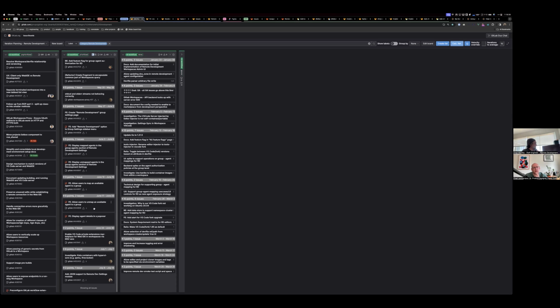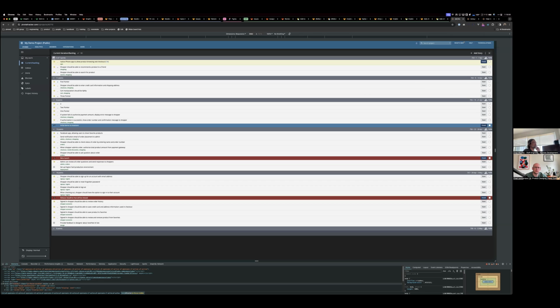You're not trying to predict the future. It's yesterday's weather: whatever you did in the past, including lower capacity, is what's influencing the future. As you can see here for Summit, ideally we would be able to say, our team strength was 0 this week, therefore it should count 0% towards calculating our velocity. And Pivotal Tracker has that same sort of thing here.